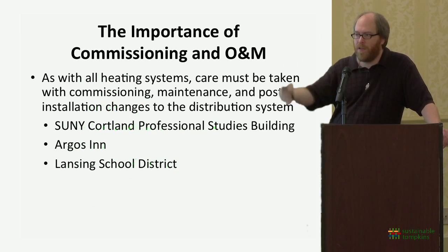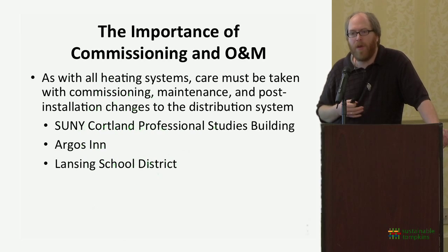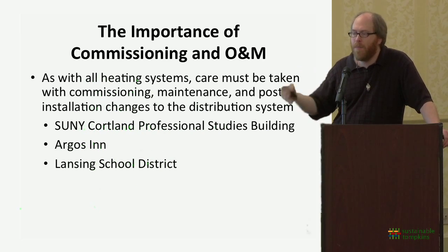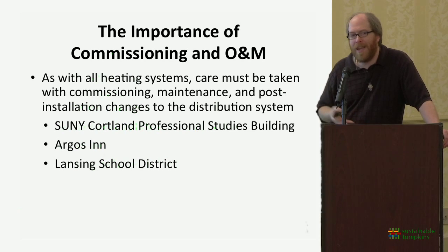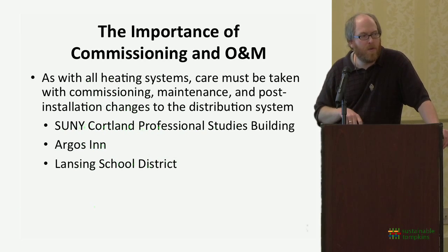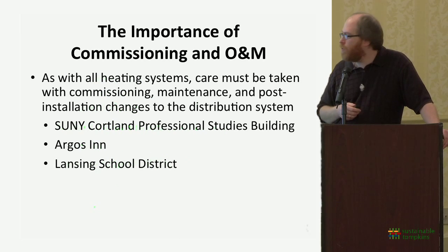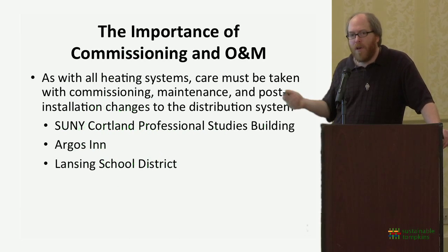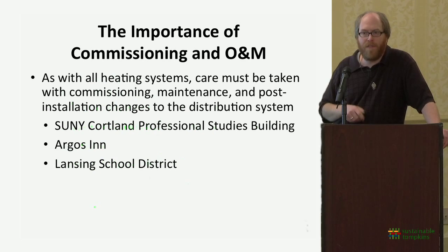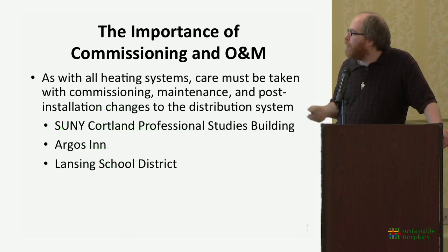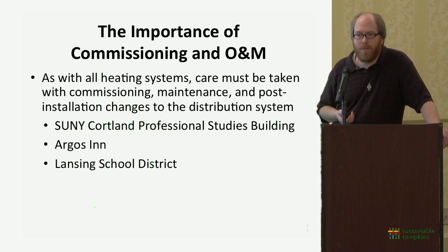The distribution system had been redesigned at some point after the heat pump was put in. The heat pump was working fine, but the distribution system that was designed didn't take into account some of the unique characteristics of that heat pump system, and that caused some issues that had to be resolved. So these systems do work very well once you get them up and running, but you do have to make sure that they're commissioned properly.